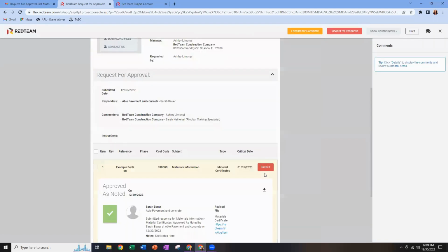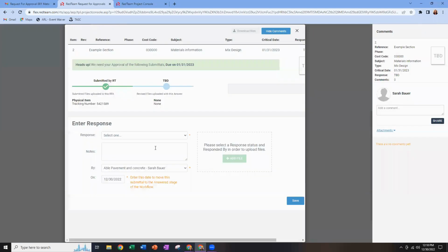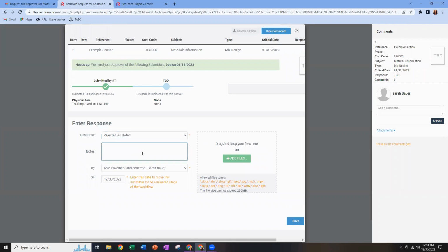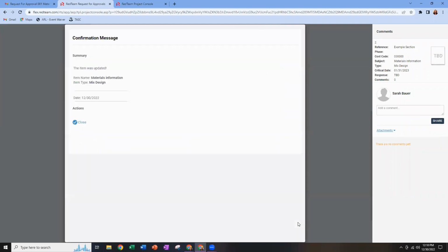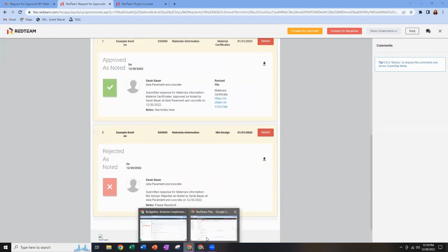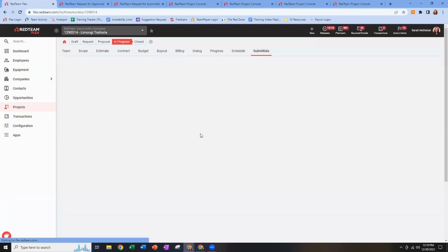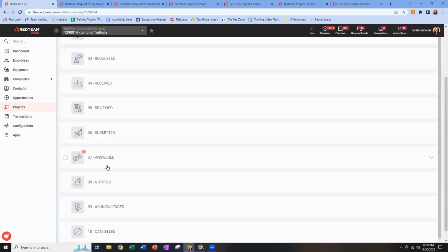That will update, letting them know that this one has been answered, and we can go ahead and answer the second one. We'll call this one rejected as noted, and we'll say, please resubmit. We'll save that. Again, if there were any files they had wanted to include, they could. But now we've got our answers here. And as we return to your submittals page within your Flex database and refresh, those items drop down to answered.